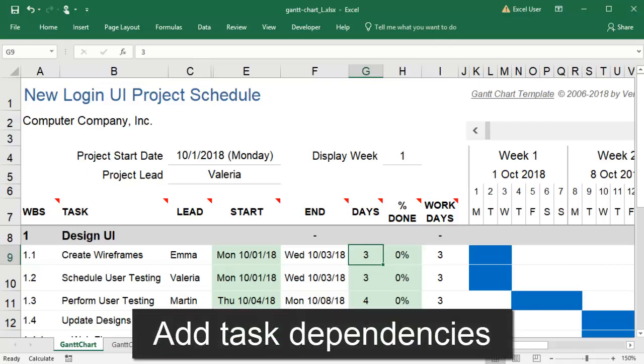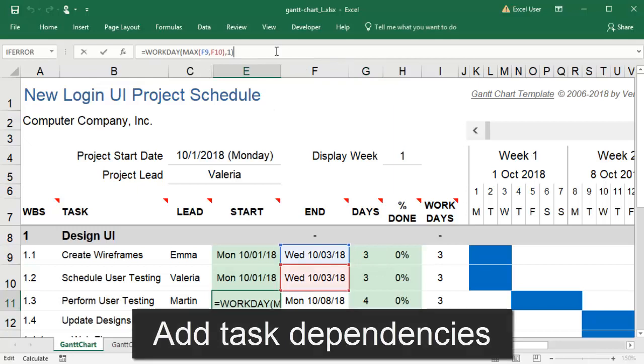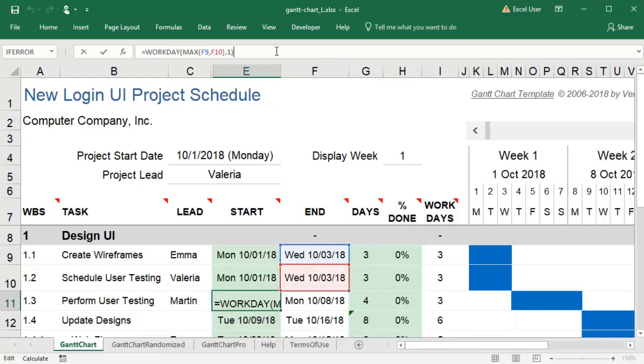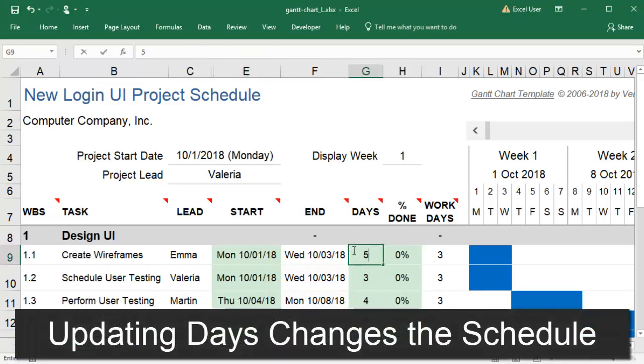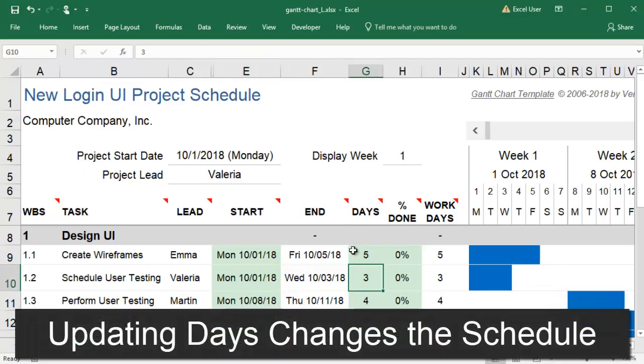I want to be sure that my Gantt chart is set up with task dependencies so that a change in one task duration will affect the timing of other tasks. If I update my estimated number of days a task will take, my project end date will shift.